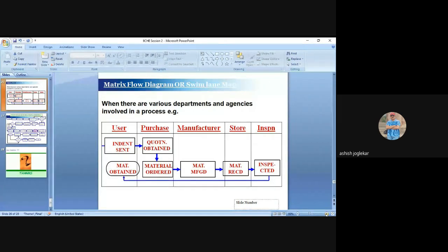That is, write the specification, prepare the specification, write it on paper, take the manager's approval, then put it in the system. So in quotation, take quotations from 3 vendors, analyze the quotations, then review it with your bosses or with somebody, then put the order.